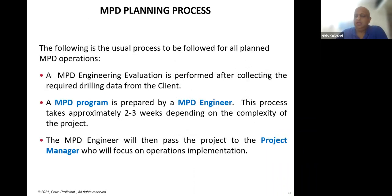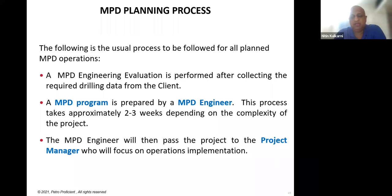Let's talk about the planning process. If you're doing MPD for the first time, it needs to be planned ahead of time. Engineering evaluations are needed to see if MPD will benefit you. An MPD program is prepared by an MPD engineer — the process takes approximately two to three weeks depending on the complexity of the project. The project manager then takes up all the process work and assigns equipment, develops procedures, and executes the program.